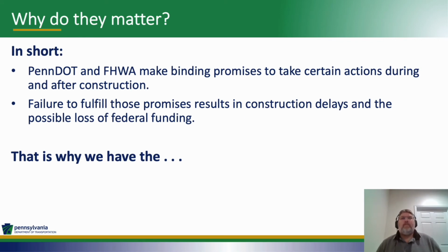So why do these commitments matter? PennDOT and federal highways make binding promises to take certain actions during and after construction. Those promises are what help us get the NEPA approval, and failure to fulfill those promises results in construction delays and the possible loss of federal funding.